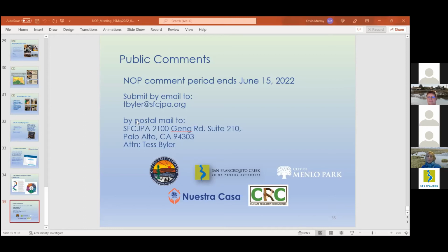Jill, would you like to say anything about how we analyze traffic in CEQA? Sure. I'll start by saying that I know that the design team will prioritize those roadways that are designed to handle more traffic in terms of the construction haul routes. Those are referred to as arterial roadways and, of course, freeways. Those roads are designed to handle more traffic.